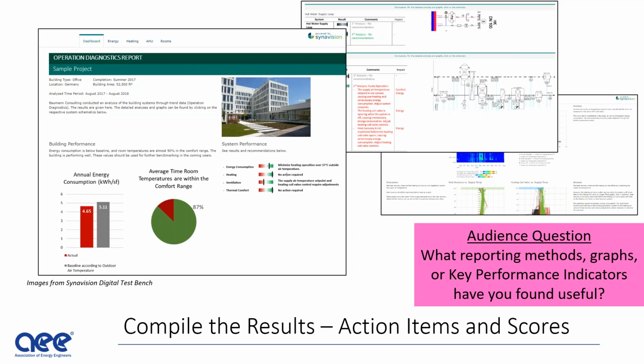Sometimes that works really well, and it's quick and effective if the team members are engaged and looking for that direction. And sometimes it takes a little back and forth, or it's more clearly understood and less clearly understood. What I found are the two most important components of reporting the results: one, that the current performance is determined. You can show that report card. And two, that it is clear what needs to be done next, the action item.